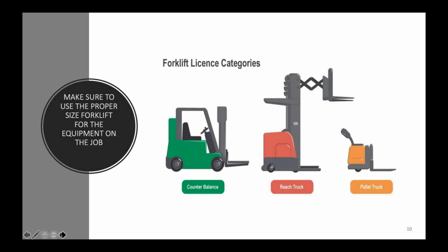When you're ordering forklifts, make sure to get the proper size. Now, the forklifts in the pictures I've been showing would not pick up any of that. So you have to tell your rental company what you're going to be loading or unloading and how much that's going to weigh.